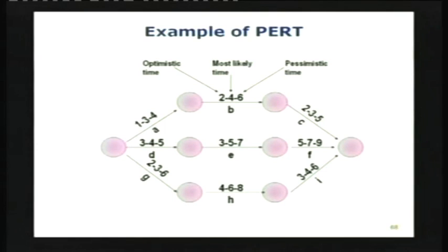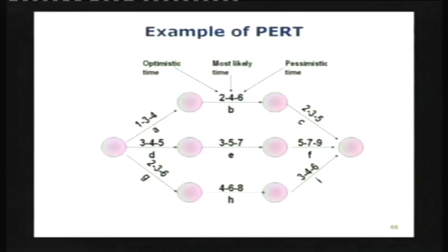Let's just recall for a minute, how did I construct this diagram? What was my starting point? Started with a charter. Then tell me. Identified the scope. Good. From scope I got to the WBS, work breakdown structure, and the work breakdown structure eventually brought me down to work packages. The work packages are now my tasks. Those are the tasks I'll assign to different contractors, subcontractors. Those are the tasks I see here, A, B, and C. These are the different tasks that have to be completed by people.